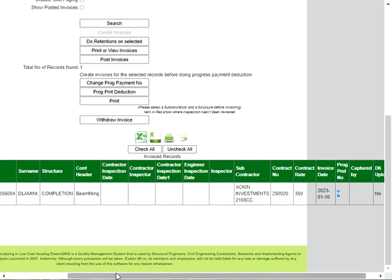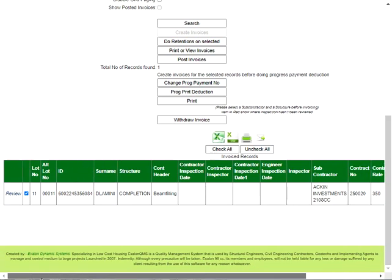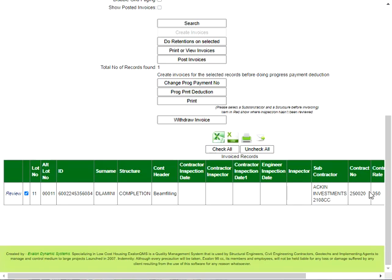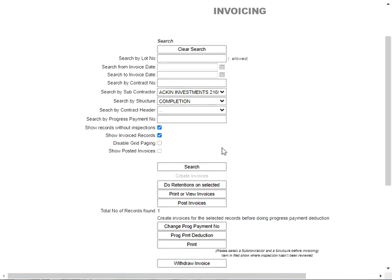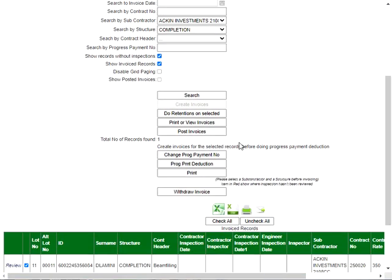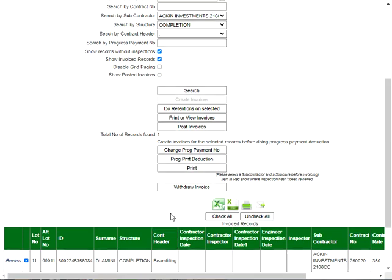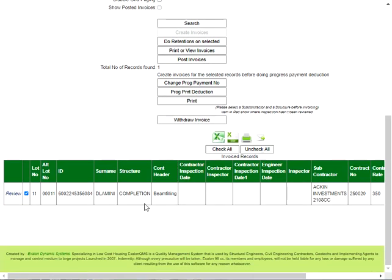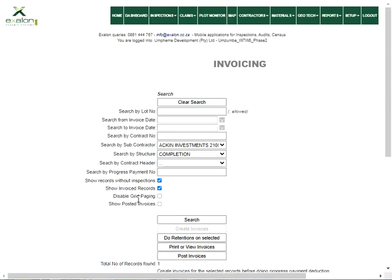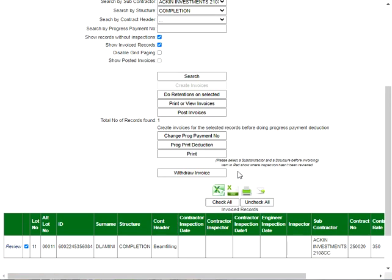And if you post them they can't change anymore and then also the number of the progress payment will increment to number 10 for the next batch. And when you do searches here it will only bring up the one that hasn't been posted. Anything that's been posted is in the past and you can't change them. Anything that comes up here will be ones that have not been posted, and that's all you have to do.